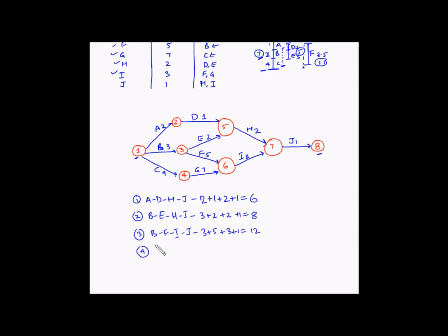The fourth path starts with C. Path C-G-I-J has durations 4 plus 7 plus 3 plus 1. So 4 plus 7 is 11, plus 3 is 14, plus 1 is 15 days.